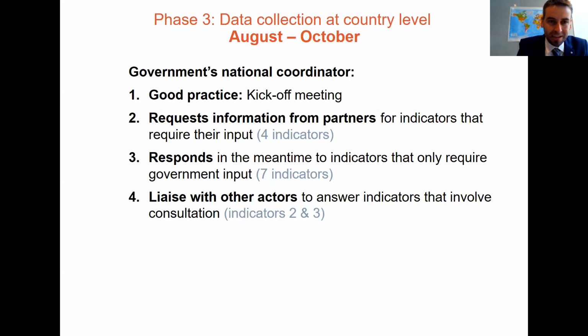The second step to be very efficient is, before we start with any other indicators, maybe sharing the request for information and data from your development partners, because they will take some time to collect that data and put it together back to you. So that maybe is a good practice to send this early on.